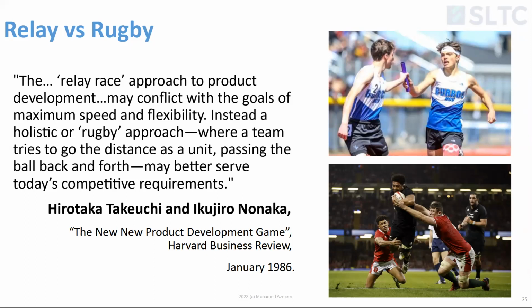So until the first person reaches the goal, the second person cannot do anything. The second person is waiting and waiting, right? So that is called the relay race method. Not a very good way of doing things. But if you take an example, let's say the person who's building the database, until he finishes the database, let's say the coders can't do their work.